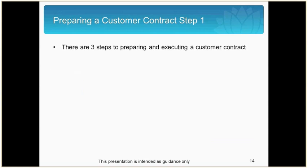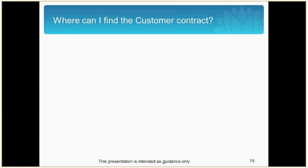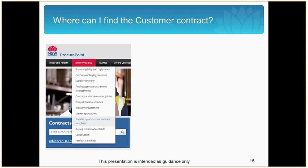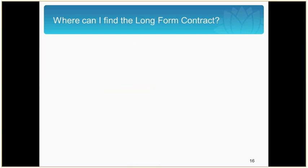We will now look at preparing customer contracts. There are three steps to preparing and executing a customer contract. The first step is to download the customer contract template from the ProcurePoint website. On ProcurePoint, at the top menu there is a 'Before You Buy' tab. If you click this, on the menu you will see a link to standard procurement contract templates. Click through and you will see links to the short form and long form ProcureIT contracts. ProcureIT was updated to version 3.2 on the 1st of July and became mandatory on the 1st of September. I would also like to draw your attention to the beta website, which has information on the long form contract.